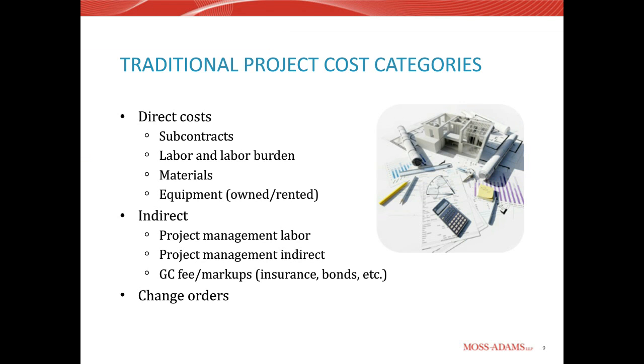One thing we wanted to cover real quick, and on this call, we know we have a range of people from project managers who deal with this every day to people in more of an accounting role or in a management role where they aren't in the weeds of a project and really might not be that familiar with construction projects and accounting for construction projects. So most of the projects and the risks we're talking about today are associated with cost reimbursable type projects, guaranteed maximum price projects, where it's not a lump sum or a stipulated sum contract.